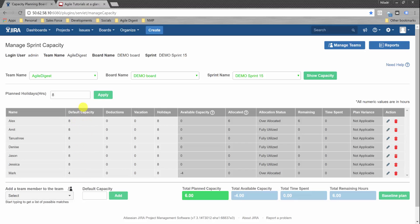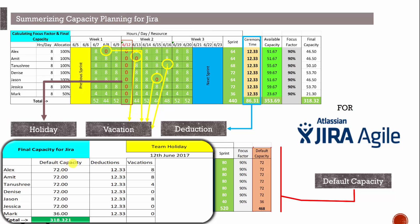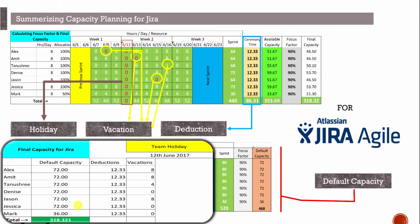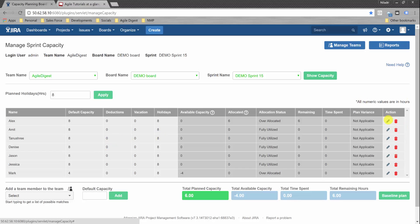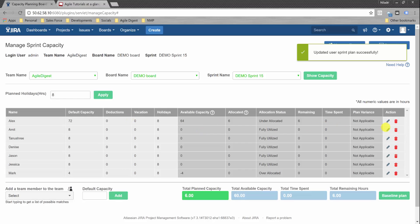This shows the current team members and their default capacity. We can change the default capacity as per our spreadsheet calculations. The default capacity is 72 hours for everyone and 36 hours for Mark, based on our focus factor calculation. We click Edit and change the value to 72, then do the same for all team members.